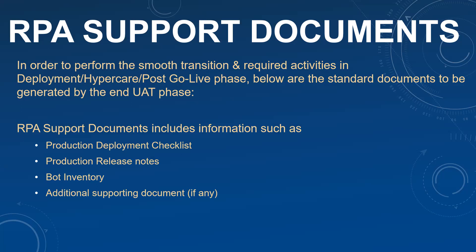There are three documents which are proposed. One is the production deployment checklist, next is the production release note, and then there is a bot inventory. But these are not the only documents which need to be presented or are suggested. Any additional documents you think can be of help for production migration or post-production go-live also need to be prepared and handed over to the support team for better management of the bot in production or even at the hypercare phase.